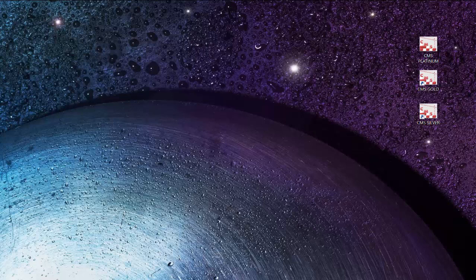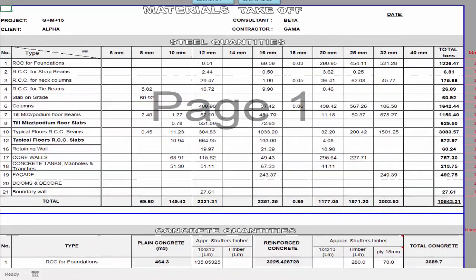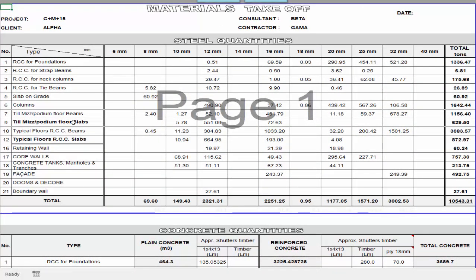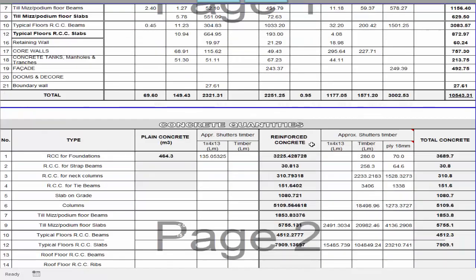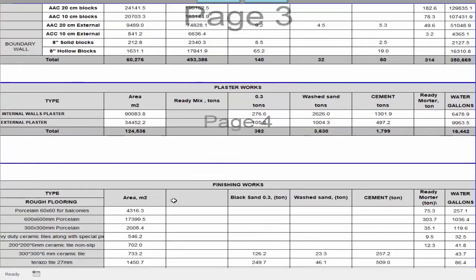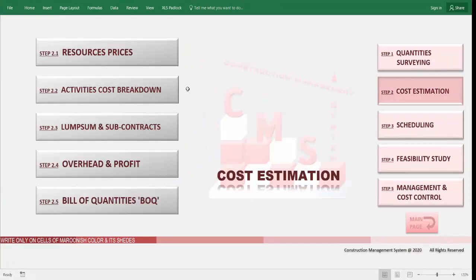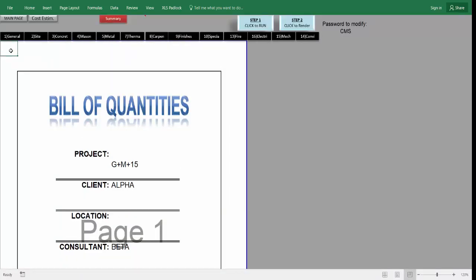CMS will help us in quantity surveying work — providing a material takeoff with detailed material required for each element and activity, like concrete work: how much steel is required for each element per diameter, what is the required concrete, the required shutter for the concrete, the required block and related materials for block work, plastering and finishing for all projects. CMS will also provide a clear cost estimation for each activity, an activity cost breakdown for overhead and profit, and an automatically produced priced bill of quantity with all construction divisions.